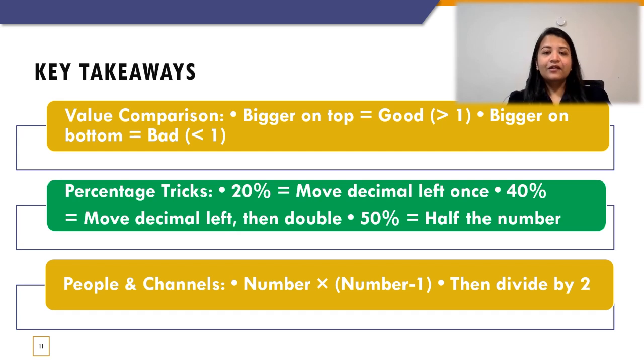Next, if we come to those percentage tricks, which is to identify the EMV value given the probability and the risk impact, you can solve it using the mental math trick that we discussed, which is to divide by 100 to remove the percentage sign, or if you are comfortable, just shift the decimal point and find the answer, which will be much easier too.